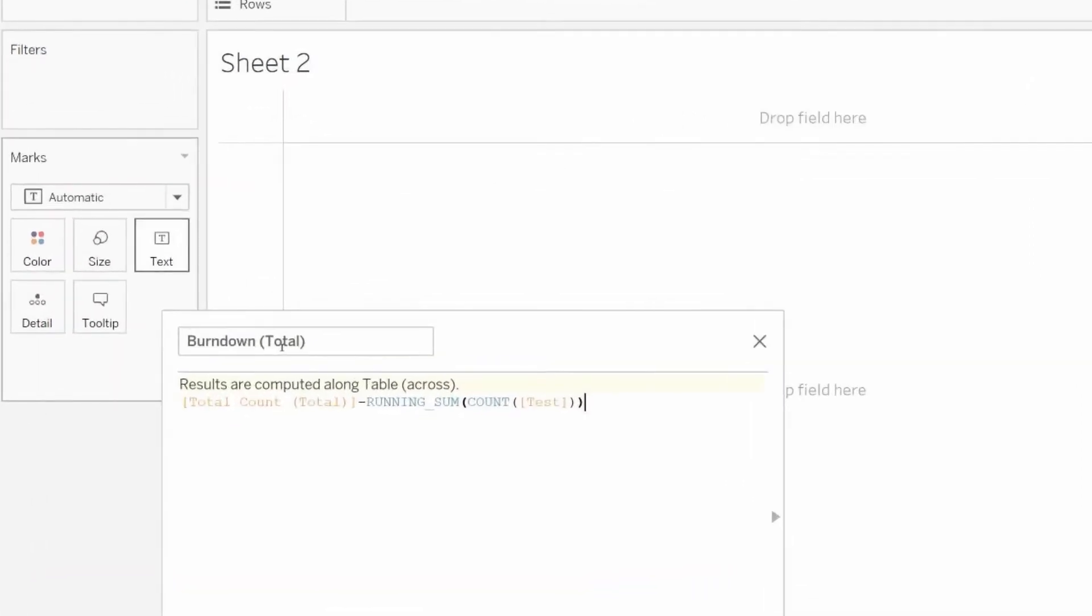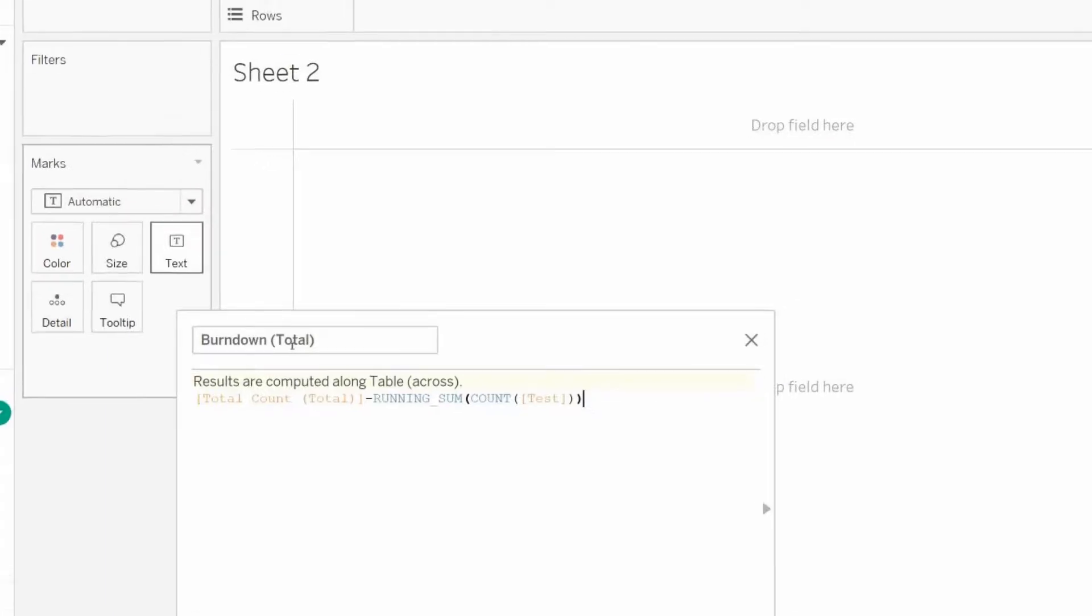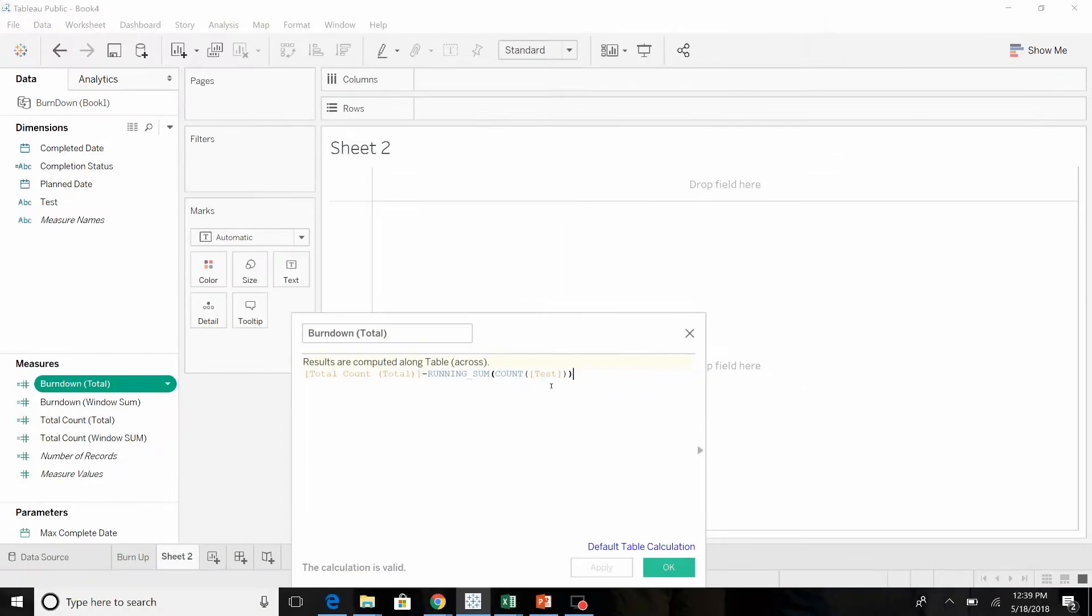Here's the formula for the burn-down value. We're taking the total number of tests and subtracting the running count, the running sum of those tests. That's the same formula we used in part one.